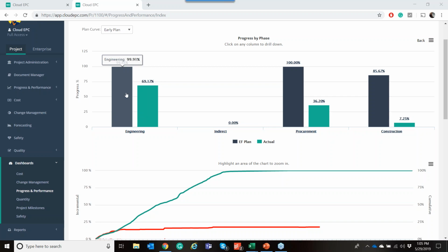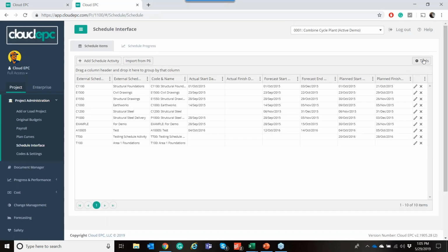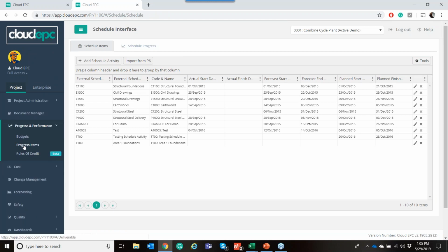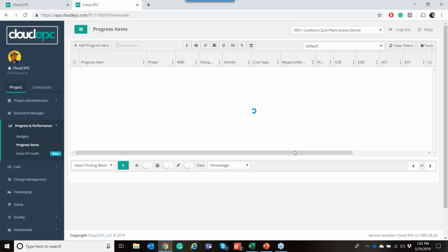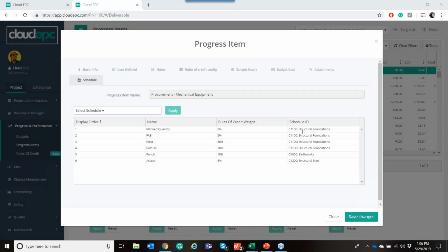But Halasio wants to know, does your tool import from P6 as well? Is that how you get your scheduled data into it? Yeah, so we have the ability to import right from Excel. And then if you are using web services, we can import from P6. You take those scheduled tasks, and just like I showed you in the Excel version, you can apply those schedule IDs onto each one of these tasks. So you're just going through a mapping process, just like you're doing in Excel.